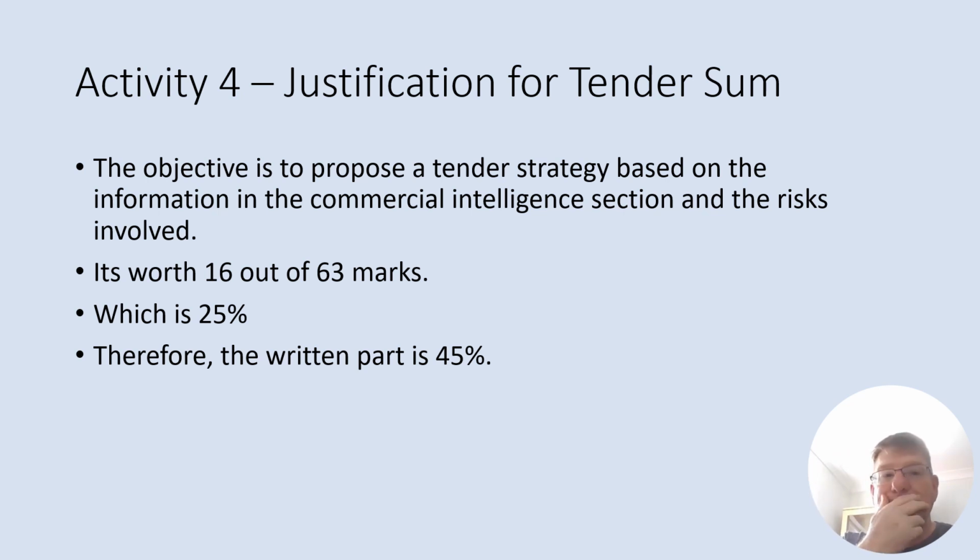And also, because you've met 90% of your annual turnover for that year, you only have to find another 1 million, 1.5 million, probably maybe 2 million. So you only need another contract really to make the 22 million. You may want this one to pass you by. You may not want this particular contract because the risks involved actually outweigh the gains, because you could probably think, well, I'll wait for another 1 or 2 million pound or 3 million pound project to come onto the market.